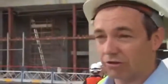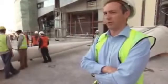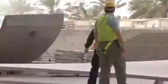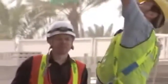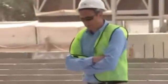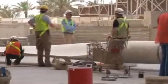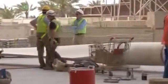The following day starts out with a stark reminder of the wind's unpredictability. We had a storm last night, so I think it just gusted up. The wind speed got up to 110, which we've never heard before, and it blew from the south. Currently we're at 85 wind speed. There's no way we're going to be lifting anything. Forecast is not good. The engineers have set 21 kilometers per hour as a cut-off point for lifting the blades. Anything higher is unacceptable. With winds howling at 85 kilometers per hour, all they can do is wait.